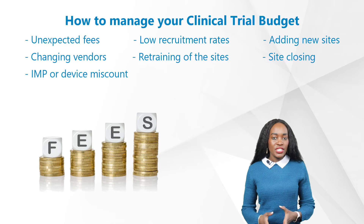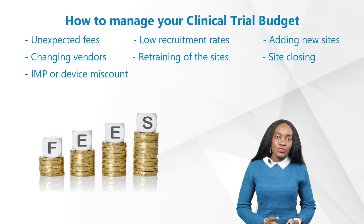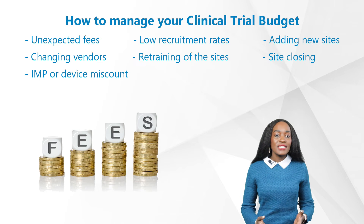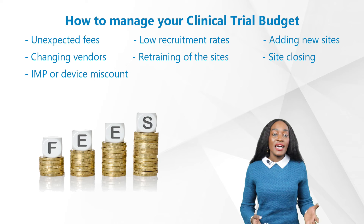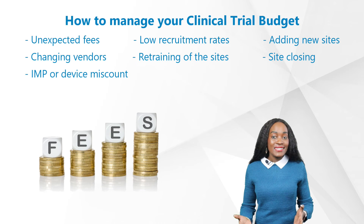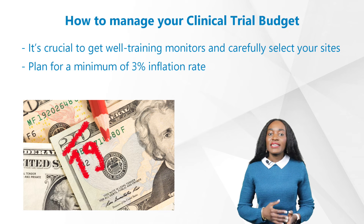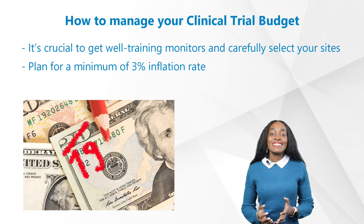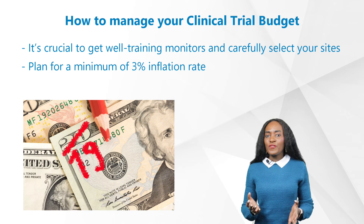When calculating your budget, also take into consideration unexpected fees such as protocol amendments, low recruitment rates, and delays — including adding new sites, changing vendors, retraining of sites if mistakes caused delays, site closing, IMP or device miscount, and similar issues. It is therefore crucial to get well-trained monitors and carefully select your sites.